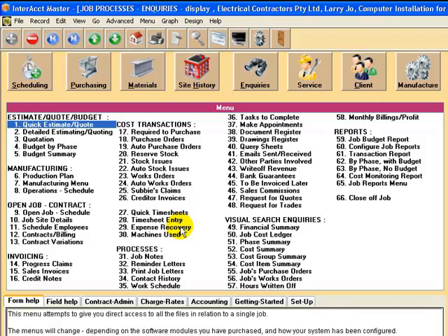The quick timesheets is more where you've got an existing work schedule where you've actually scheduled who should work on this job by date, and then by calling up that schedule and clicking on a button that says literally start work, it records automatically the time that that employee worked on the job, and of course you can pause and restart and eventually end the task. The system then calculates the time automatically. So you can do that semi-automatically or as a quick data entry, or in the normal timesheet entry by date by employee.